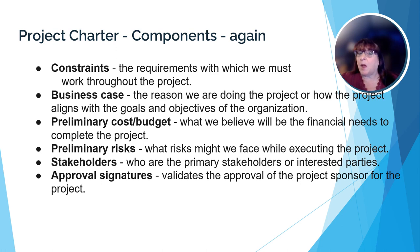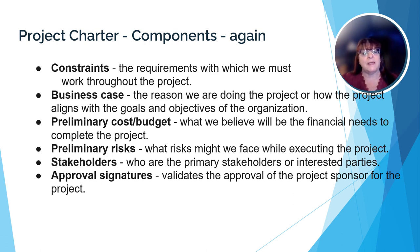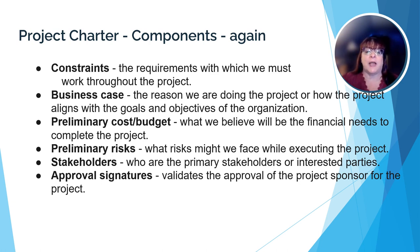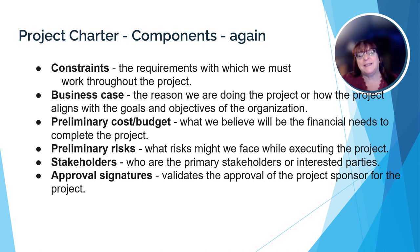The project charter will also contain what the team has deduced the cost of the project will be. It will list any risks that may impact the completion of the project, at least as the team has deduced before beginning. The project charter will contain a list of the stakeholders in the project, meaning anyone who has a stake or interest in the project deliverables and what their role is. Finally, the project charter will contain the signatures of the project sponsor, giving the team permission to begin the project.